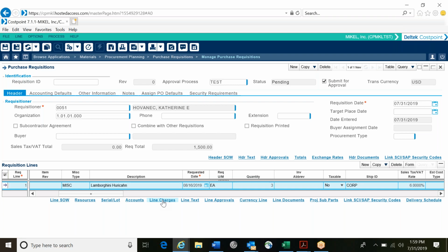So we're relying on the purchase requesters to make sure that the vendor quote has all of that included. You know what this gets back to? The template that we were talking about. Coming up with an RFP or RFQ template that program managers or requesters can send out to the supplier, that breaks that out by piece with a total at the very bottom. That bottom total is what goes in, and we can go back to that and see what it included: shipping, tax, and so on. So that's all the more reason why the three of us should work on that template and capture all that information and have it available.